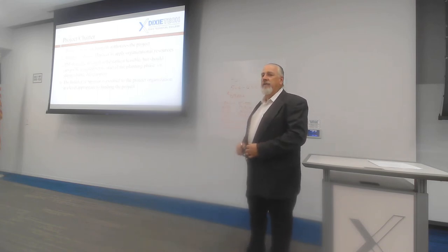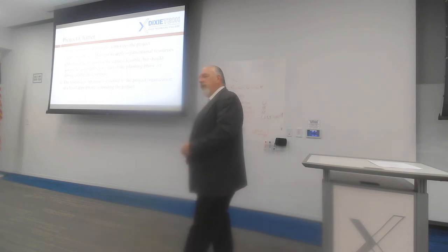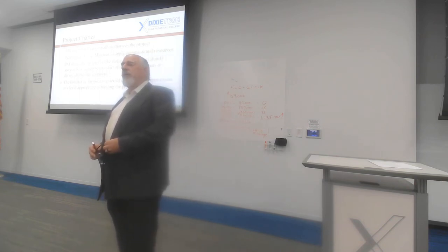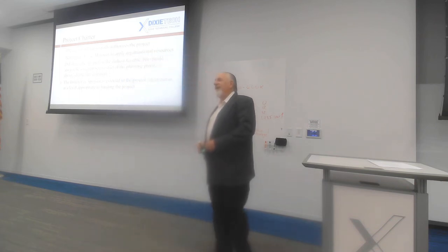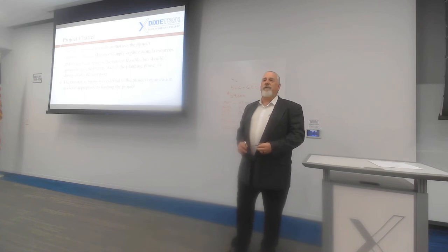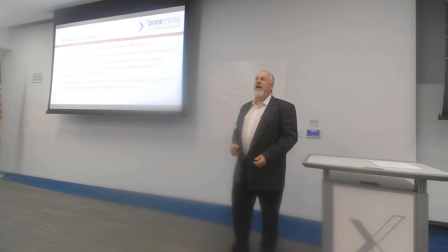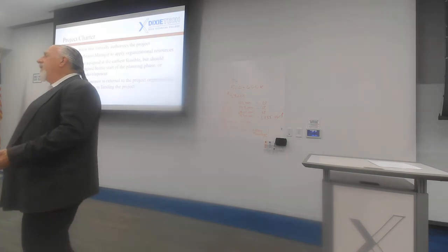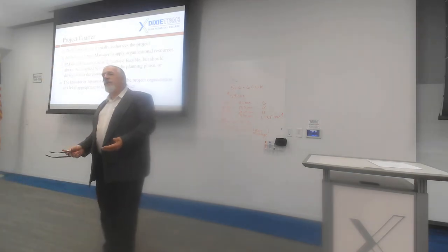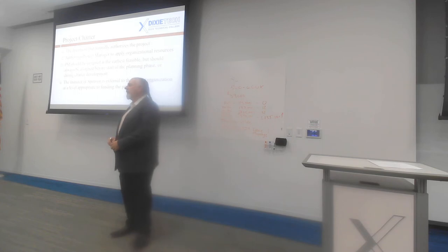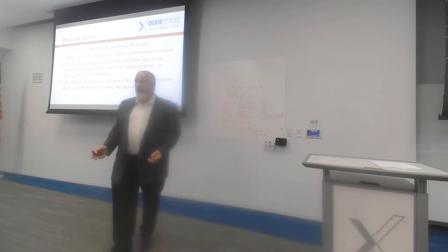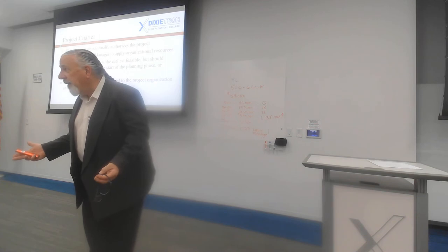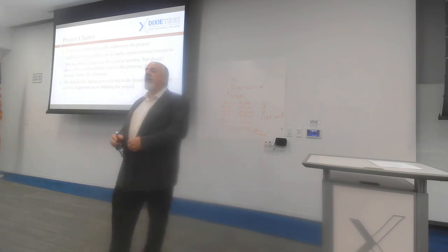And I always have a boss sign off on it so that as you're wandering your way down the project, they don't change your mind on what they authorized you to do. I have seen a lot of bosses think they said one thing, and we all heard a different thing, and halfway through they go, no, that's not what I said. Well, let's go back to the project charter. Let's look at what we all agreed to. And if we've covered all of our bases in the project charter, then it will save an argument down the road when somebody says, well, I didn't mean that. Well, okay, but man up. That's what you said, and that's what our project charter agreed to.